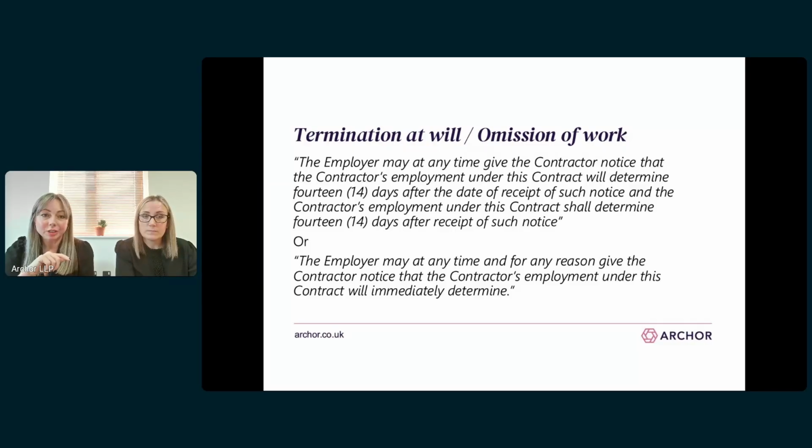In addition to this wording, you'll often find a provision making clear that if the employer does terminate at will for any reason, so it doesn't have to be a breach, then the contractor is not entitled to recover the profit it has lost on the remainder of the works to be carried out. As I've said earlier, this could have a huge impact on the contractor's projections for that year. So the contractor needs to make sure it is absolutely content to agree to this wording from a commercial perspective.